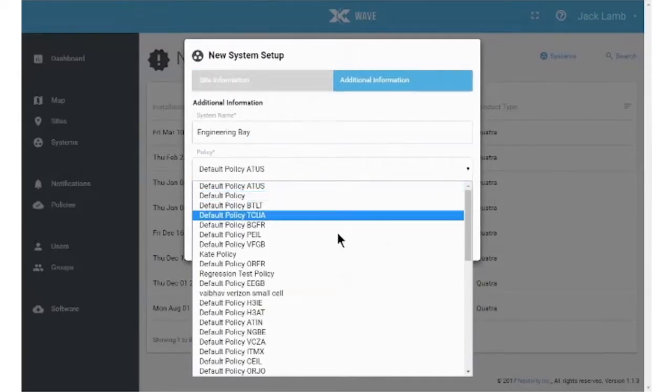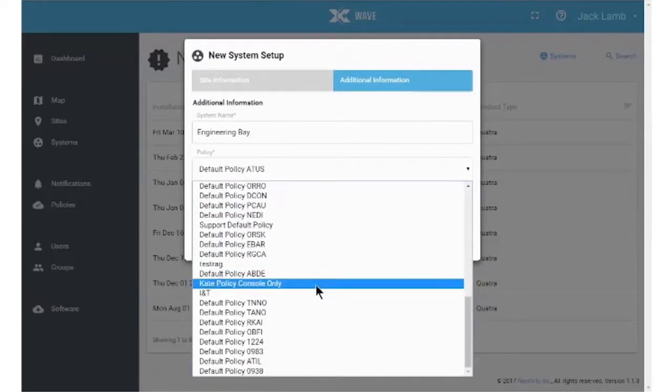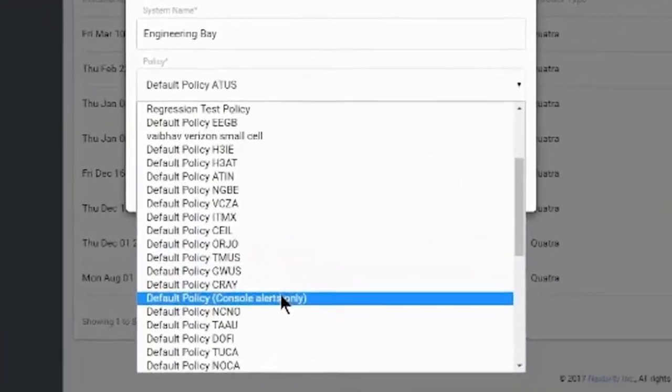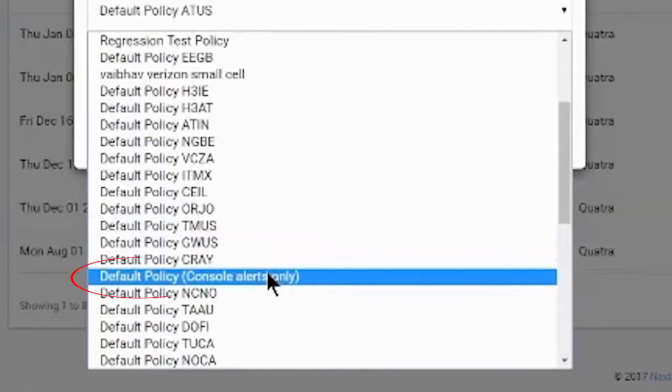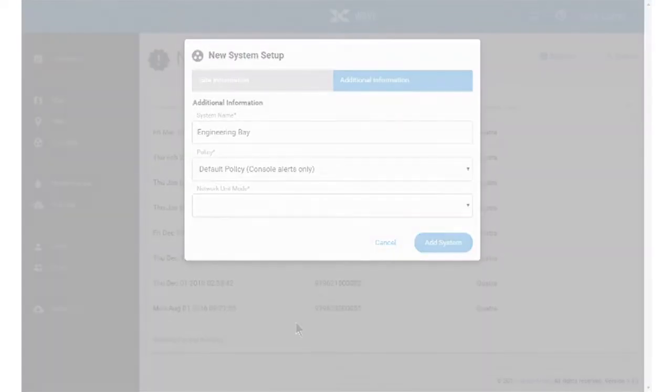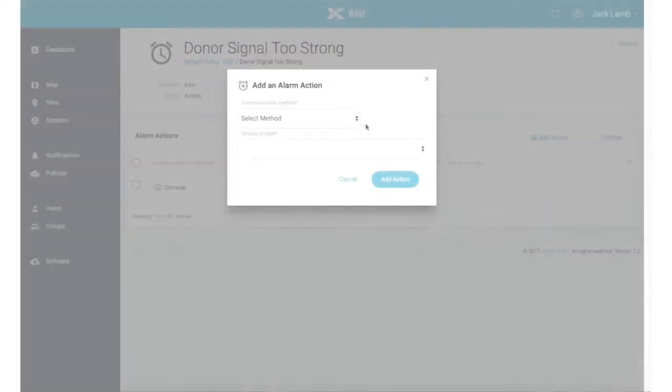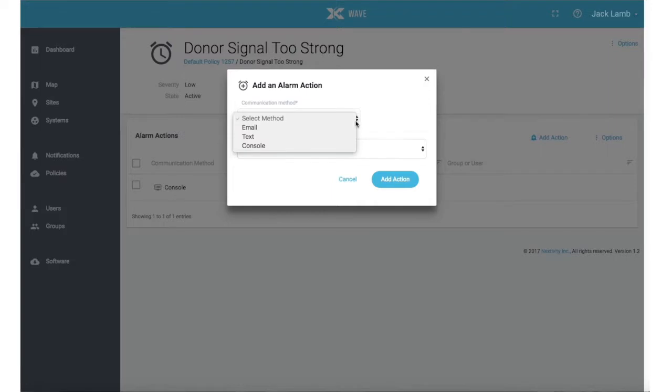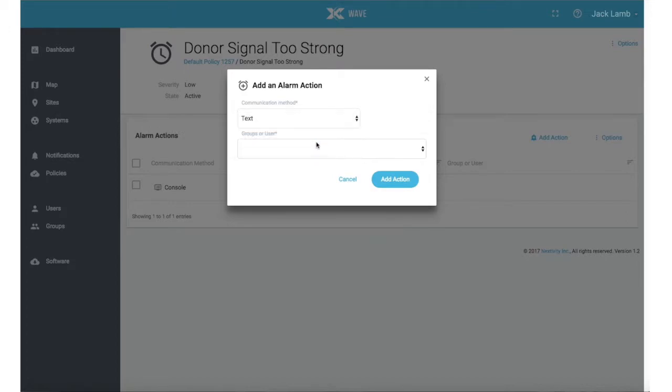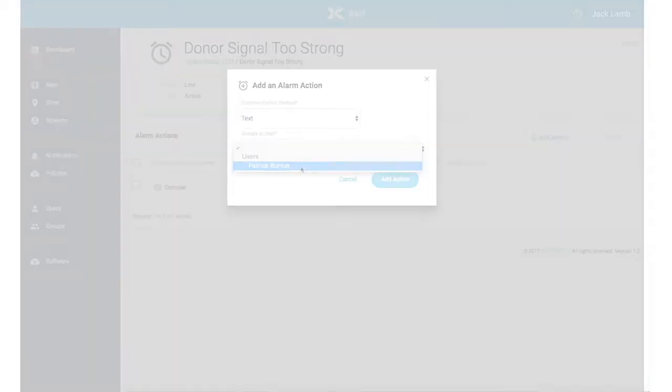Selecting a policy is mandatory. Your system should have a predefined default policy that allows all important alarms to show up on the portal console. You may select this default policy or create your own to add email or text notifications to individuals or groups. You will not receive any notifications unless you create a policy to do so.